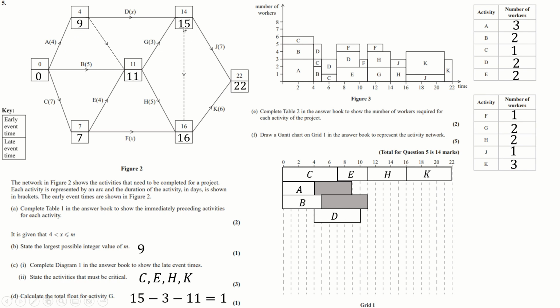But you can finish as late as hour 15. Then we go to E. F is the next one we haven't got, which starts at hour 7 at the earliest, takes 7 hours, can finish as late as 16. G is the next one, can start at hour 11, only takes 3 hours, can finish at 15. And then I think I was missed, so we get to J, which is 5 hours, and then you can finish that, 7 hours, and you can finish that an hour late if you want to. And we'll get this picture here, so that's good.